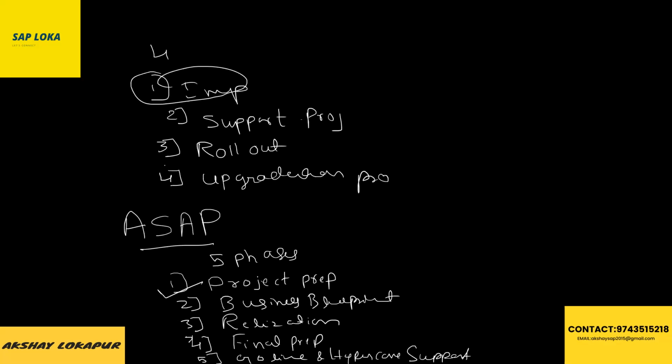This first one we have discussed last class, right? In project preparation, we have prepared a project charter. What and all things contains in project charter, we have discussed: project logo, project deliverables, team allocation, high level activity, project manager is involved, right? So everything we will mention, and we will take the sign off for both the sides, business side and project side. Okay.